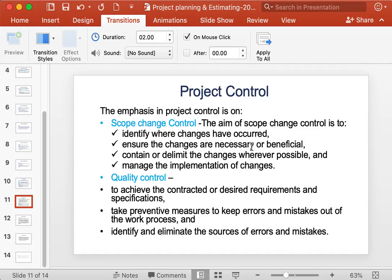Scope change control aims to identify where changes have occurred, determine if the changes are really required or beneficial, contain or delimit the changes wherever possible, and manage implementation of changes. The main aim of quality control is to achieve the contracted or desired requirements and specifications, take preventive measures to keep errors and mistakes out of the work progress, and identify and eliminate sources of errors and mistakes.